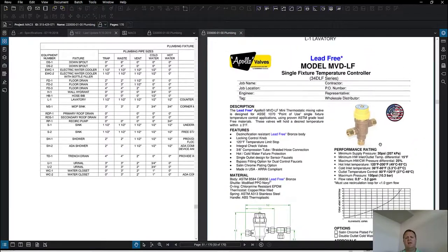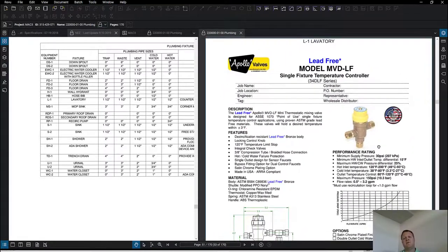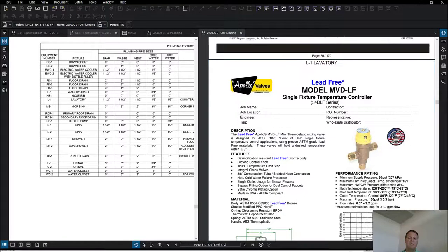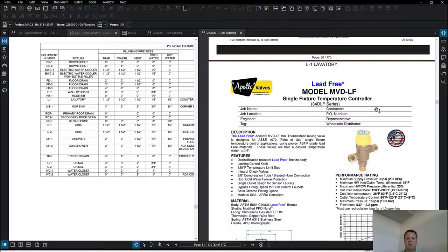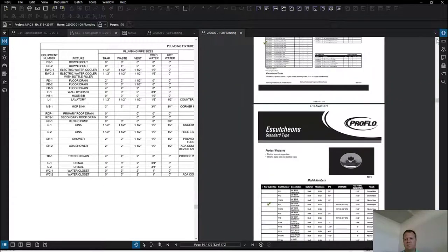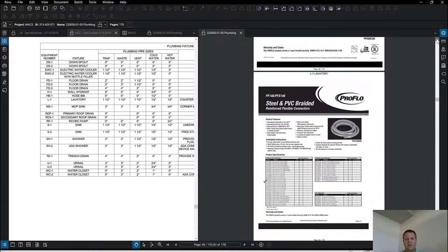And so, is this information super useful during construction? I don't know. I mean, it's something that the engineer really cared about and bothered to specify, so we need to make sure that it's part of the project. Is it a major coordination piece? No, because the plumber is going to do that by himself. It's a standalone component within the water system. But the sink itself, that touches all kinds of stuff. There's an interface there.